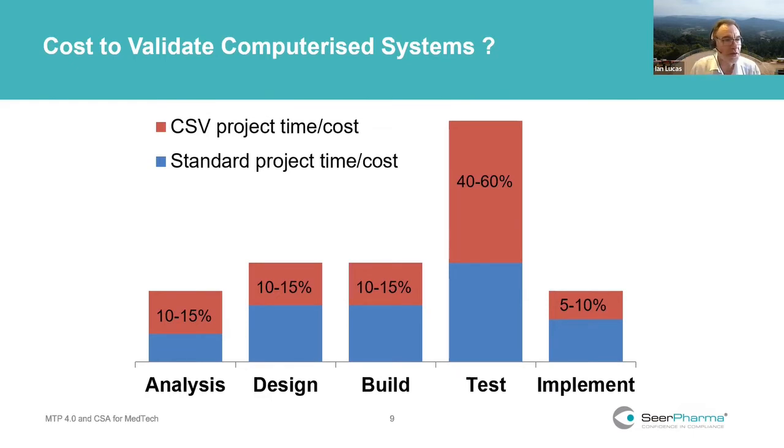What of agile methodologies? You're on mute, Tim. I can't hear you. Agile methodologies. Very good point. It doesn't matter whether you're using a waterfall approach or, and most people these days are using agile. And agile is not about prototyping. I've seen people use agile like a prototyping approach where they'll go off and try things for 2 weeks, come back, that didn't work, let's try something else. Agile still relies on you having a priority list of requirements, and then updating that list so that you can put it into sprints and do 2 weeks of work or whatever.